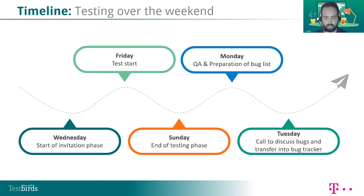testers. Our testers get a notification: hey, here's a test. If you have time, you can sign up and you can start testing. From Wednesday to Friday, we prepare the test and finalize it. We prepare all the test tasks for them. And on Friday is the test start normally.